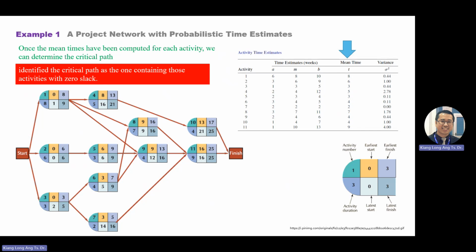Okay. So from the one I drew on the whiteboard, can you identify the critical path members? This one. This one not. This one. This one. Why? Because the middle box is the same. Third is the same. And you write critical path: activity number 1-3-4, for example.